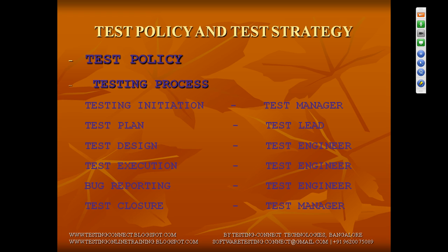Okay, so if 95 to 97% of the test cases got executed and passed, and 95 to 97%, 98% of the bugs got fixed, then you can consider this a quality application and release it to the customer. That is nothing but test closure. This is a very important interview question; if you go for an interview, you will get a chance to answer it.